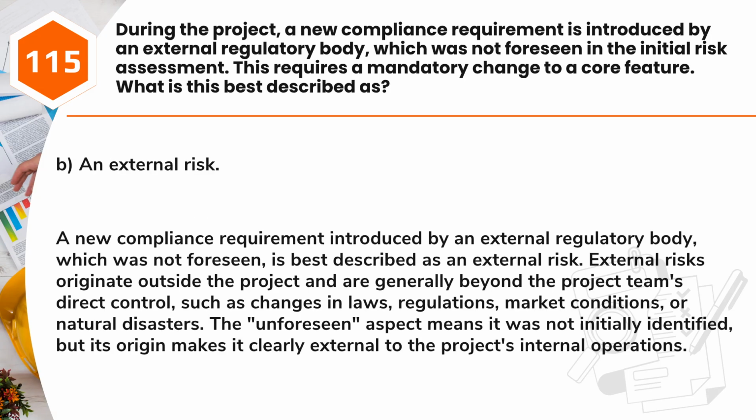Answer: B. An external risk. A new compliance requirement introduced by an external regulatory body, which was not foreseen, is best described as an external risk. External risks originate outside the project and are generally beyond the project team's direct control, such as changes in laws, regulations, market conditions, or natural disasters. The unforeseen aspect means it was not initially identified, but its origin makes it clearly external to the project's internal operations.